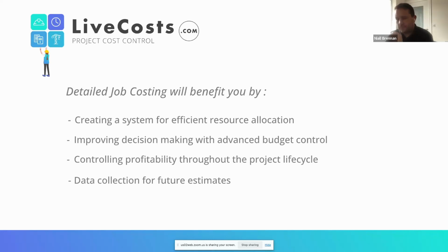Okay, that's great. And then we start allocating costs to that 200 grand. And we really don't realize that we're over budget until we reach the end of the project. So if we allow more detailed budgets, we get to understand maybe budget creep slightly earlier in the project, which means it can change our decision making.